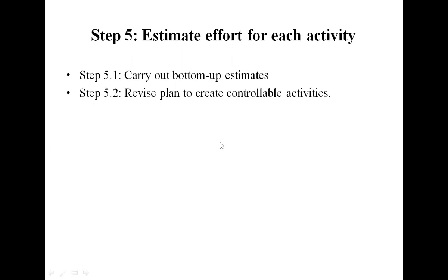After 6 weeks, we should have a maximum of 50% of the project completed. Then our process in the project is going the correct way. Otherwise, it is better to break down into smaller subtasks. If after 6 weeks you have not completed 50%, we have to break down into smaller subtasks.